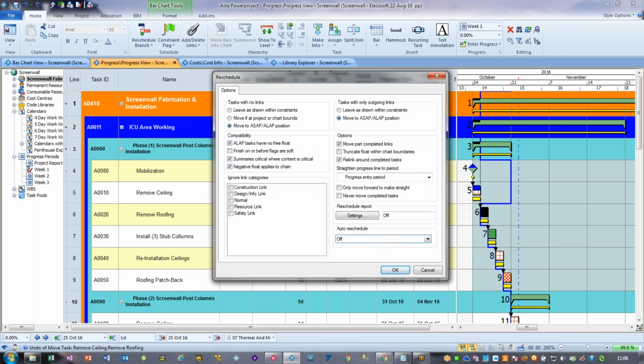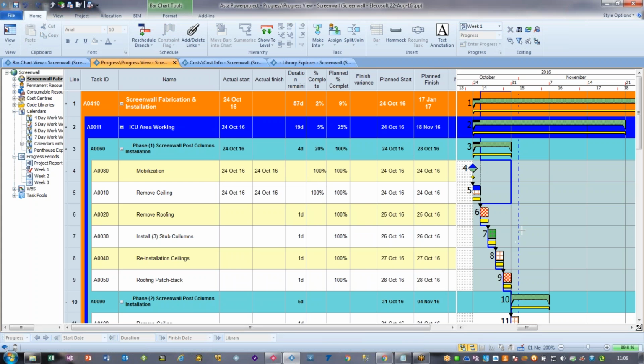have you? No. Looks like it's off. No, it's off. That's okay. So why has it moved? Oh, that's fine. Yeah, I think when you're adding progress, you should have the auto schedule off, because you don't want to schedule it till you've put all the progress in.